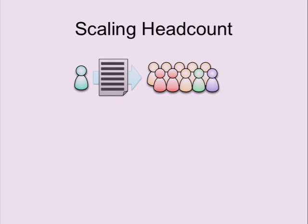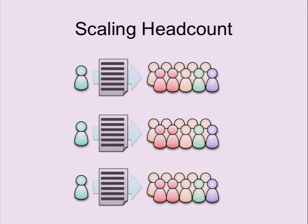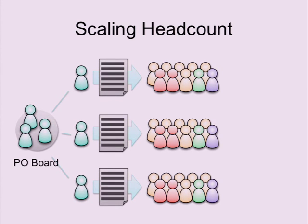If you put 12 or 15 people in a Scrum team, the idea of a self-organizing team will not work out anymore. So if you scale a project, like in our case, you can't work with a single Scrum team. So what you do is use a bunch of Scrum teams, all with the same structure. In our case, it's 7 currently, 8 Scrum teams, different sizes. And now you need coordination between the Scrum teams. What you typically do is a Scrum of the product owners. So the product owners have a master backlog and work on it, align the tasks from each team, and make sure that, for example, for the release in one year, all the activities are properly coordinated.